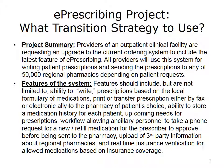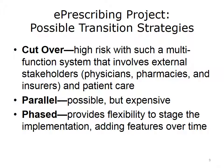Consider the pros and cons of each transition strategy for this example. Keep in mind that the three strategies can be used in various combinations. The transition must be handled carefully — after all, patients are counting on getting their prescriptions filled accurately and on time. The system interacts with many physicians and pharmacies, as well as patients, so the transition must go smoothly. Choosing a cut-over could carry high risks for a multifunction system that involves external stakeholders and patient care. A parallel operation can be very expensive and difficult to coordinate. A phased approach would provide a lot of flexibility to stage the implementation, adding features over time — this is probably the best bet given the prescribing system's multifunction nature.